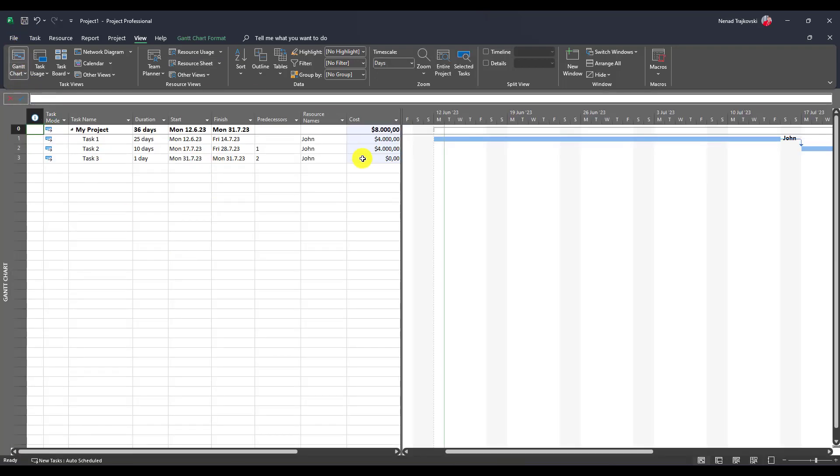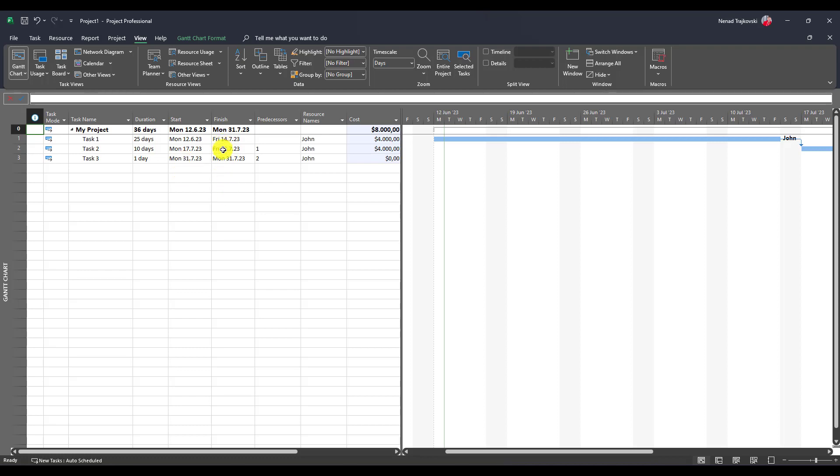But this is very annoying, because you should be careful in this case. Task one is June and July. Do I have any other task in June? No. So it is $4,000 in June, but I have another task in July. I will put it here. And this third task is all in July, and I'm not going to put anything here because I put it here. So it will complicate your life. To be aware, if you want to have fixed cost per resource, no matter how much task does it have, or how long the task is, if it goes through one month, two months, three months, it is not possible. Hope this helps. Thank you very much. Goodbye.